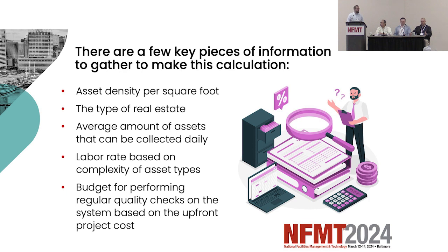It ranges anywhere from, if you want to look at it on a per asset basis, we could be $9 an asset. In some cases we've seen about $120 per asset. It's based on where the footprint is, the complexity of the assets, security restrictions and requirements. Do we have to work after hours, overnight? California has some challenges working with certain locations there. So there's a lot of complexity about how we price and what the cost is going to be, but on a meat and potatoes type of basis, it could be somewhere between $9 and $120.